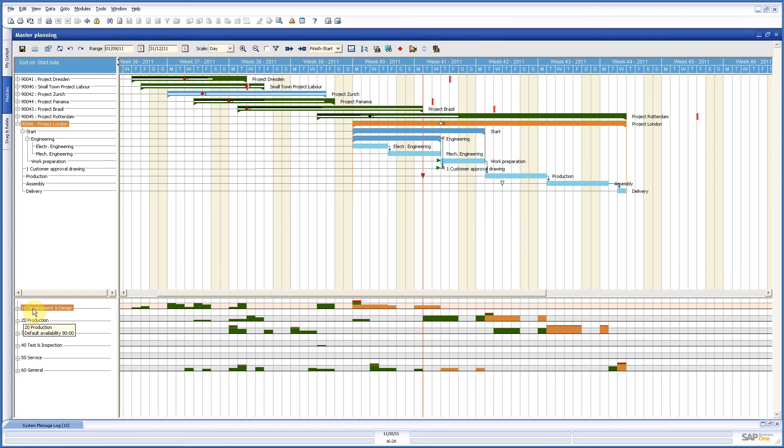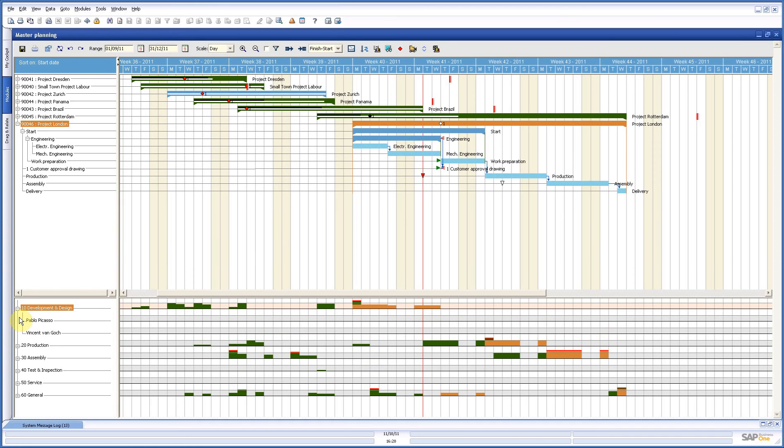Here down left you have your departments. And in the department you see also the information about the capacity. In this case it says 64, this means 64 hours a week. Now how do we come to that? Here we have two employees in our department.